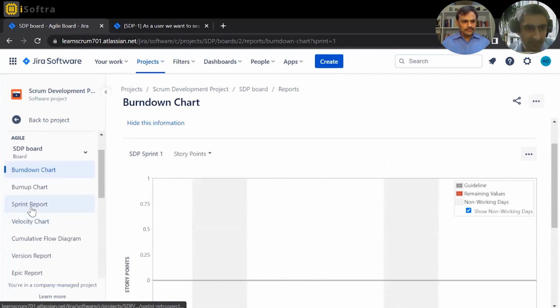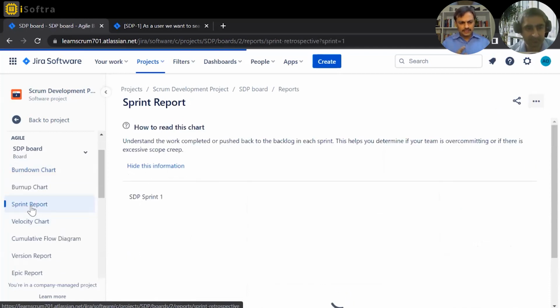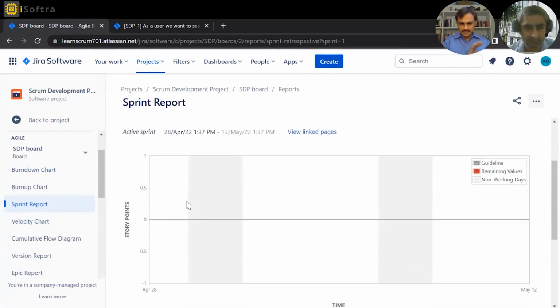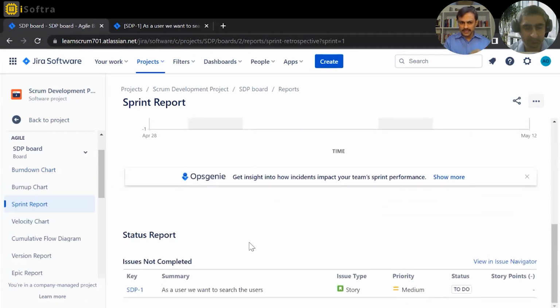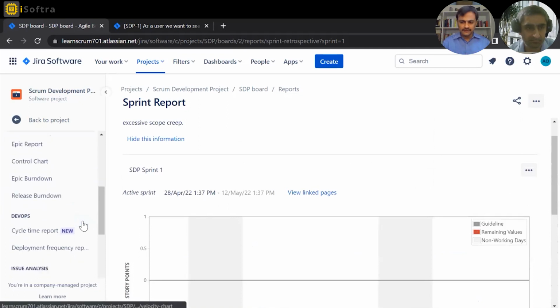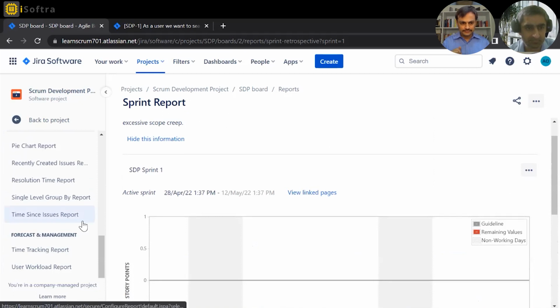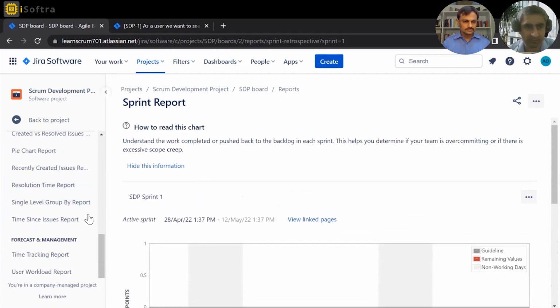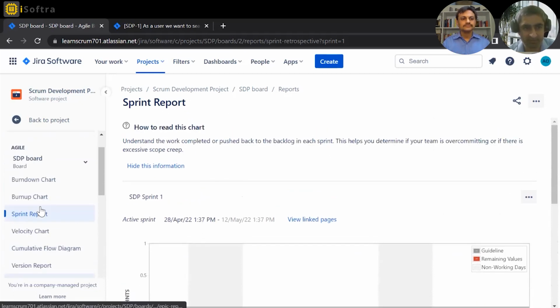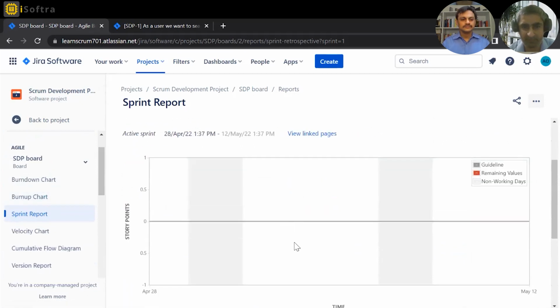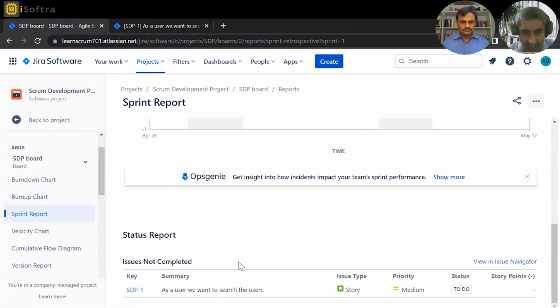Good. So similarly, we have reports we will see one by one in the other sections, but here we can just say what the person needs to get started with. So possibly some settings, and then we probably elaborate things in the next video. Yeah. Sure. So similarly, there are so many other kinds of reports. One important one is the sprint report. It would track how many stories get completed in that particular sprint, and which issues do not get completed in that sprint. That kind of sprint commitment or sprint completion report we can fetch from Jira directly.